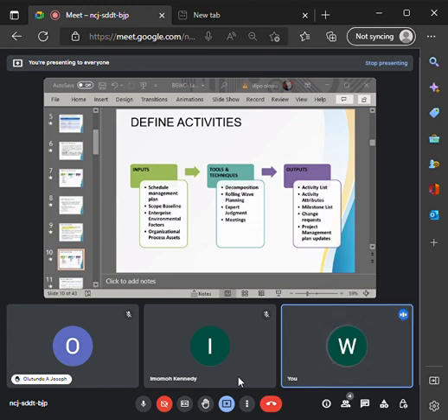That is defined activity. So defined activity is in sequencing of your project. So you need to define the activity so that you can be able to schedule and sequence your project. You need WBS so that you can have an overview of all the scope of work that needs to be done in the project. Then defined activity is now the nitty-gritty, the actual physical task that will be performed to achieve that work package. Is that clear, Mr. Joe? Or any other question for us?